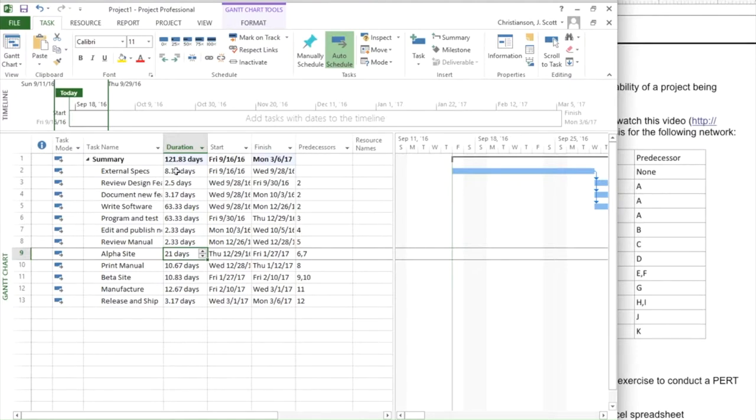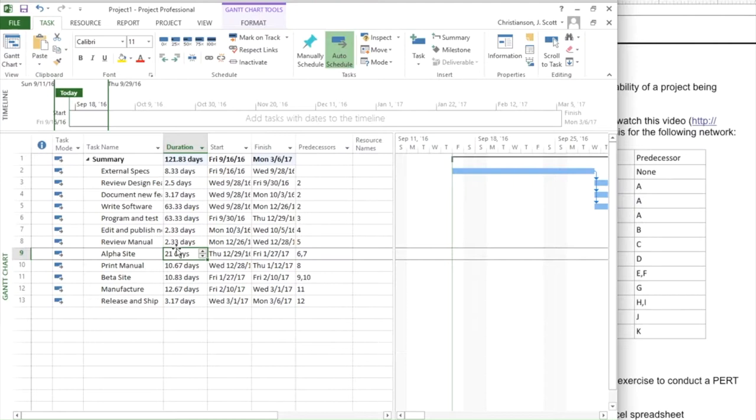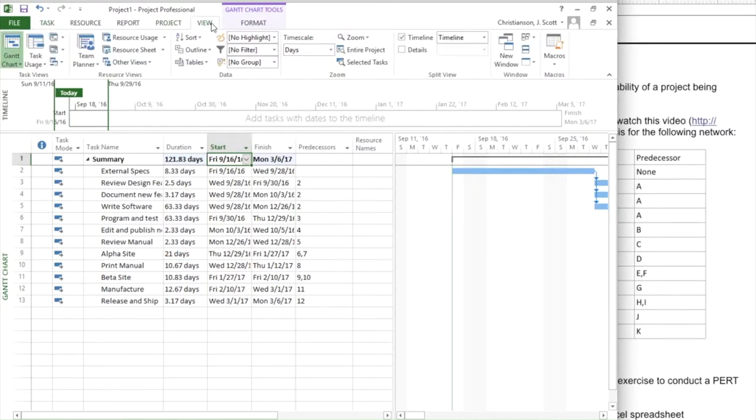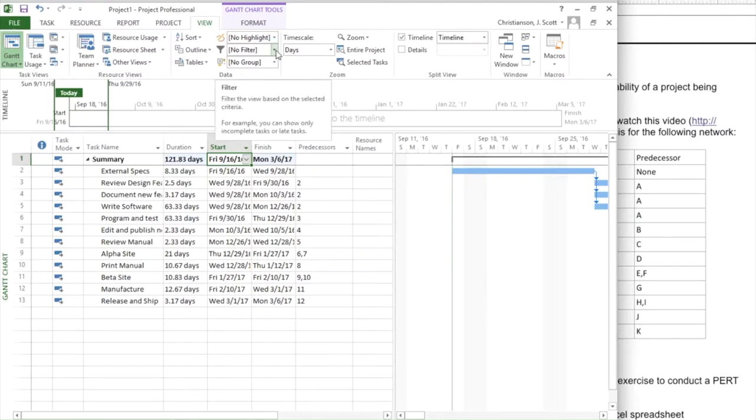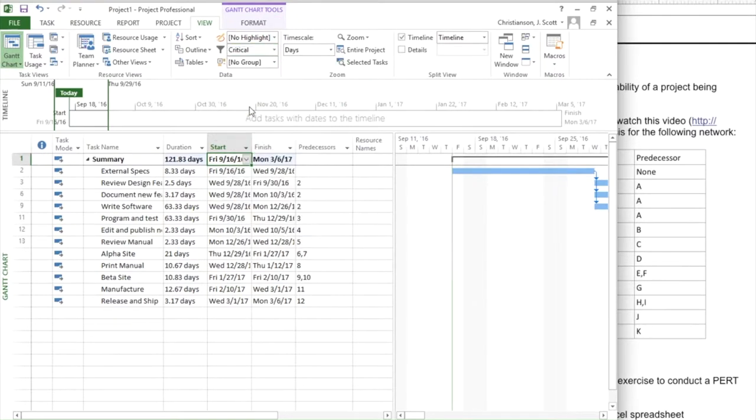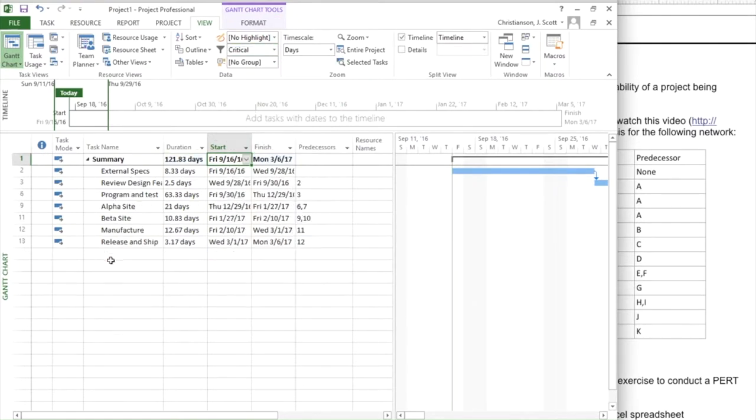Now I would like to know, the probability that it actually occurring within 122 days is probably about 50%, but I'd like to be able to figure out what is the duration that we could shoot for that would give me a better probability of being completed. So the next step here is to actually look at those tasks on the critical path. Those are the things that actually define how long our project will take. I can highlight them and select them, but instead what I'm going to do is actually filter for them, so I will only see those critical path tasks.